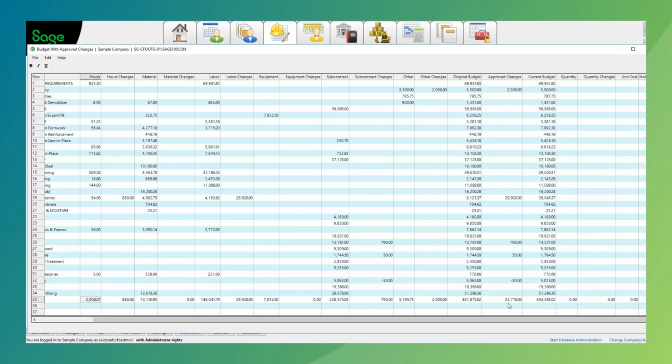Now showing us that our cost is $494,000, because the last thing I want to do as a contractor is go in and just keep changing the budget. No. We have a signed contract. We want to actually do an actual change order to show the scope of change that has happened in the budget. That way, it makes us more efficient when we do job costing.